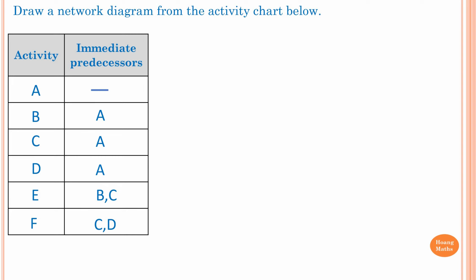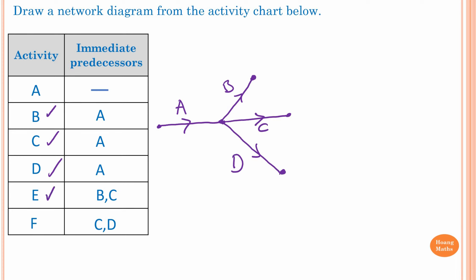We know Activity I has no prerequisites, so I draw I first. Activity B, C, and D all have an immediate predecessor of I — they share the same predecessor. So I draw B, then C, then D branching from I. Activity E requires both B and C to be complete before proceeding. So I start E from Activity B. To connect B and C together for Activity E, I need a Dummy Activity — this is the Dummy Activity — showing that both B and C must be complete before moving to E.